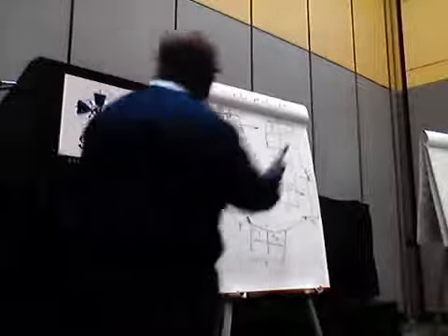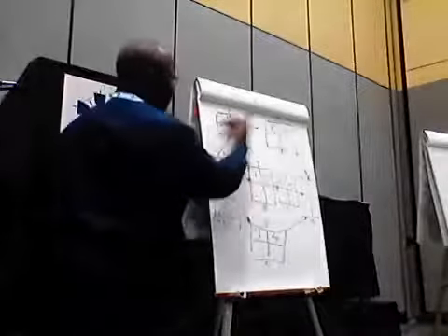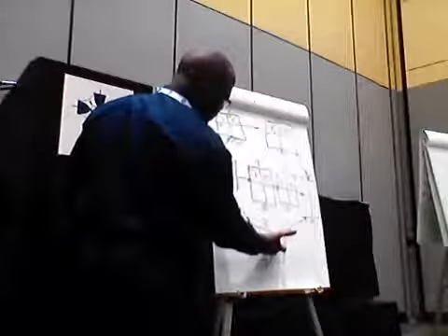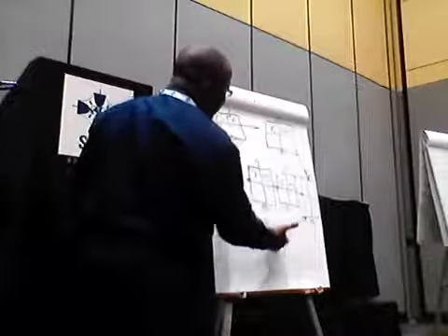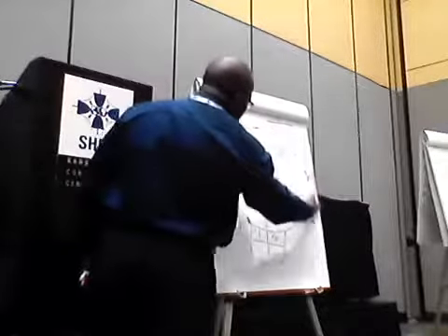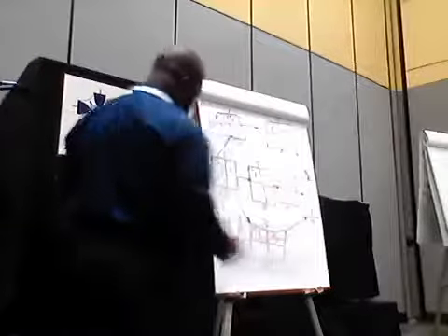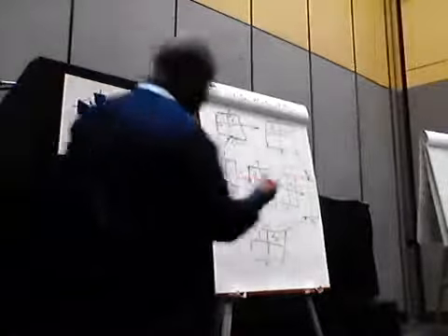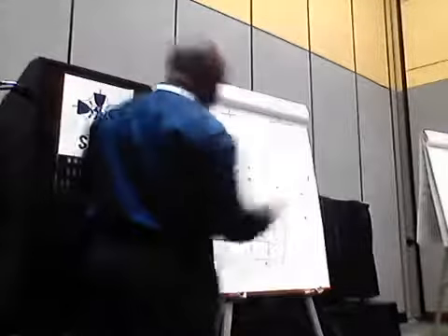So now we've got an option of 14, 15, and 4. Think about it. Frank has got to the till at 14 minutes. Julia got there at 4 minutes, but they cannot pay until Phil arrives. The payment is dependent on all the items being available. So what will go here? 15, fantastic. Thank you.